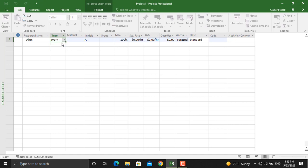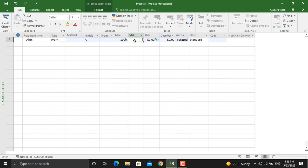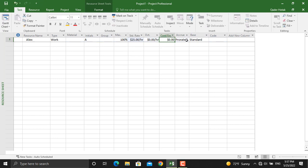We will select Work for Alex. For the Maximum Units, it shows the maximum percentage this specific resource is available — we will select 100%, which is the default in MS Project. Next is the Standard Rate: how much are we going to pay for the resource per working hour. For Alex we will select $25 per hour. In case you are working overtime and the rate is different from the standard rate, you can add the value there — we will leave it blank here.